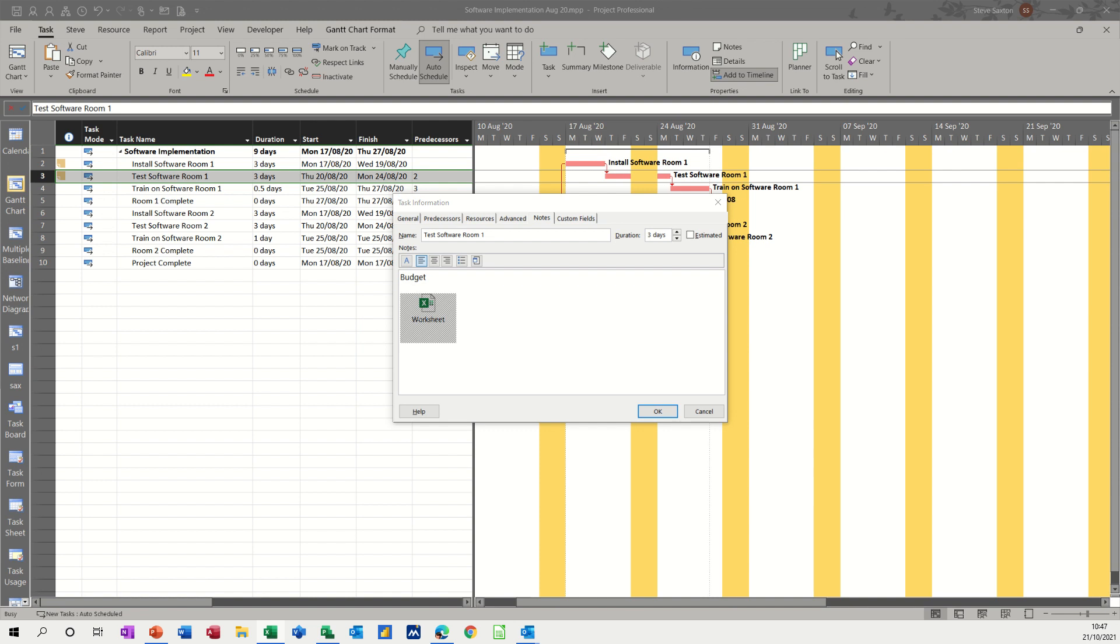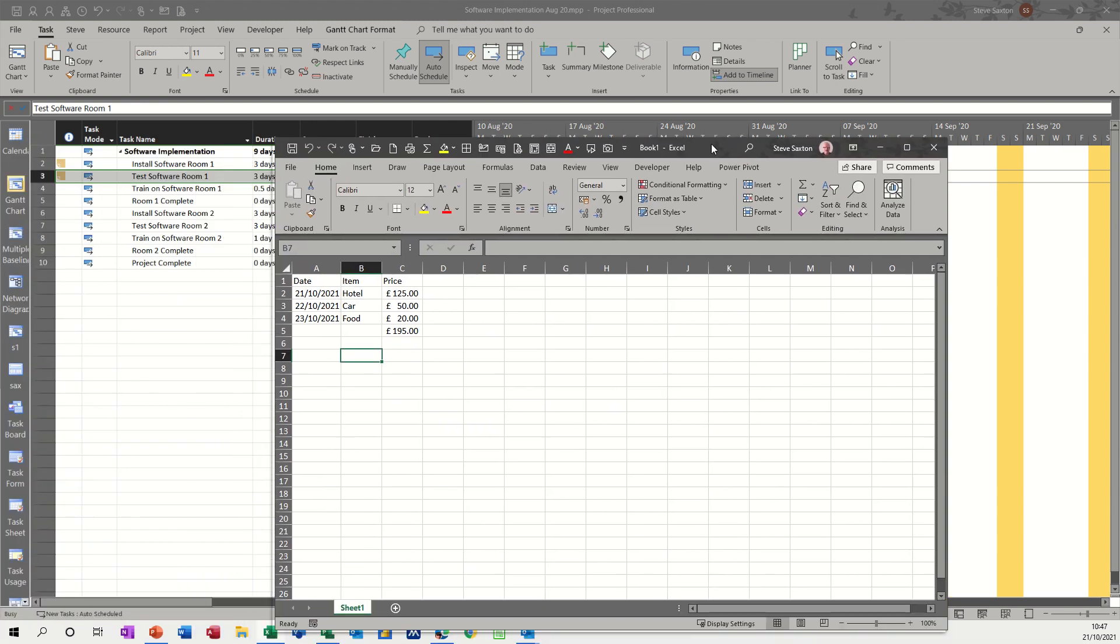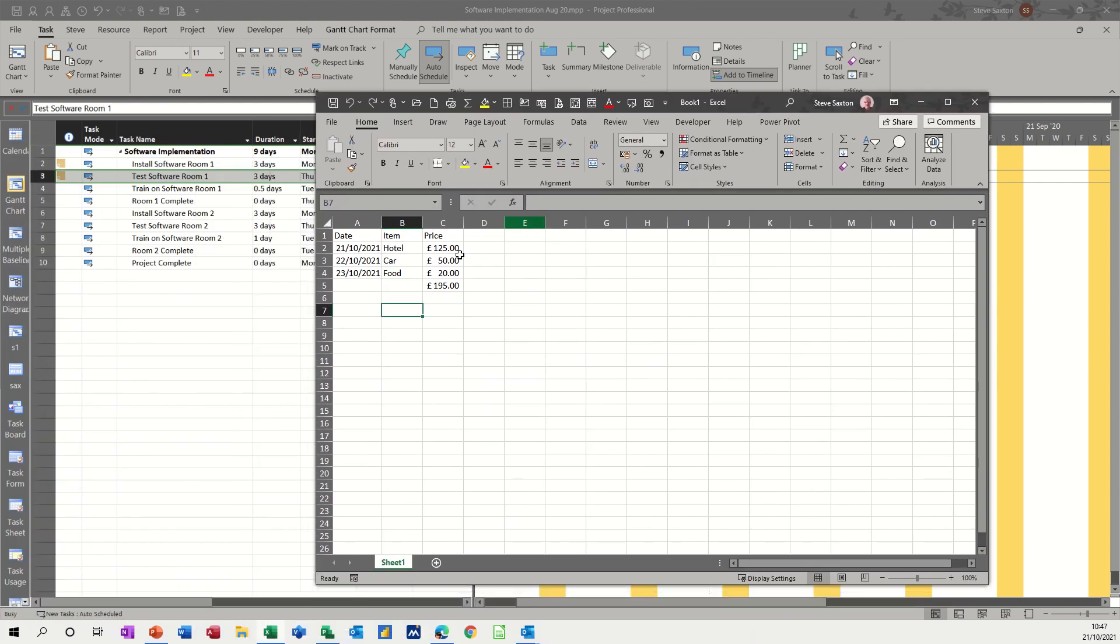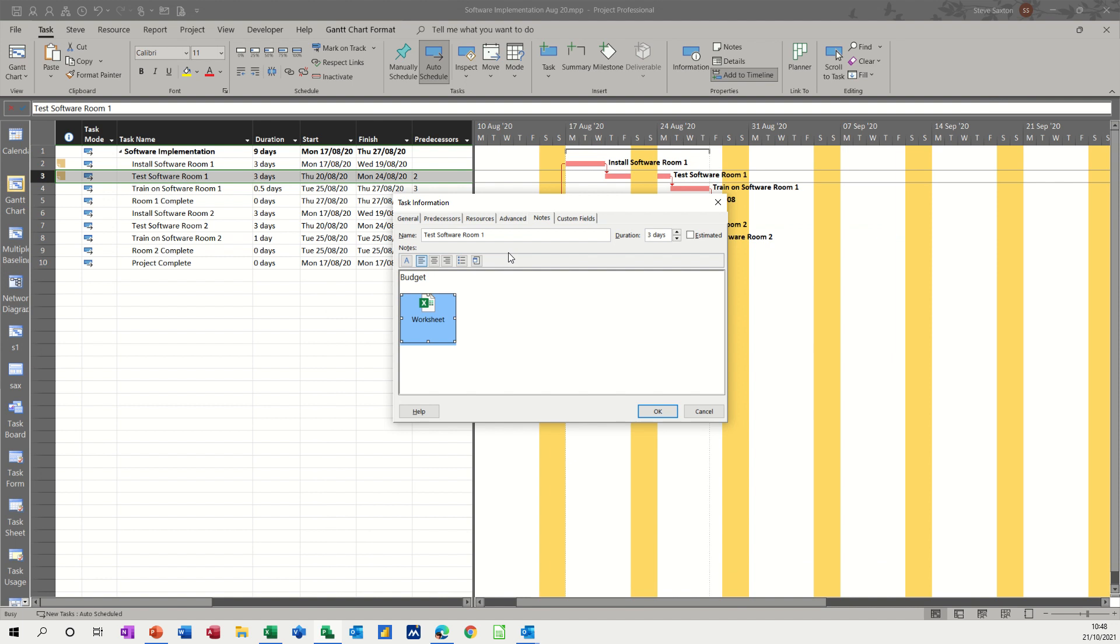I'll just bring the file back across because it's opened in a different window. And then you can add to this and change this, and the changes will be saved. So that £195 for this task is what I would put in the fixed cost column. I'll show you what I mean by that. If that kept changing, I would just manually update that, but that's just the way I like to do it.